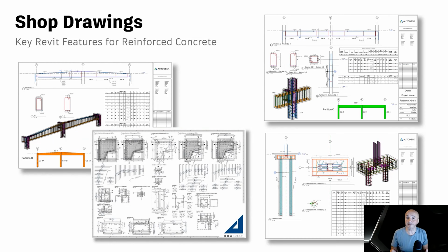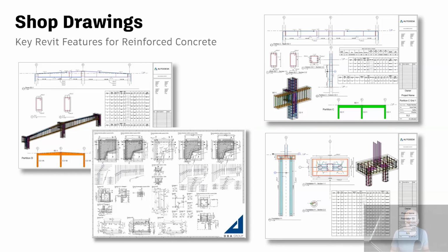Structural engineers and detailers can create design reports, drawings, and schedules from the 3D model more easily and quickly than from 2D designs, including design efficiency. The rebar quantities produced from the 3D model are more reliable than takeoffs from a 2D drawing, leading to accurate cost projections. Quantities are also fully traceable, allowing checks and comparisons to be made effortlessly.